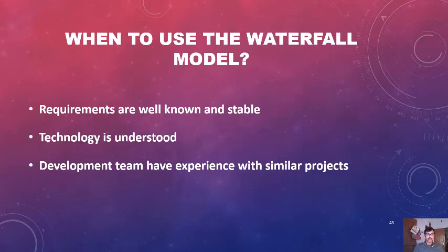When the technology is understood, when you understand which technology you will use in your project, then you can use the waterfall model. When the development team has experience with similar projects, they can easily understand what difficulties may arise, and they can rectify them in the early stages. So if all these constraints are fulfilled, then you can use the waterfall model.